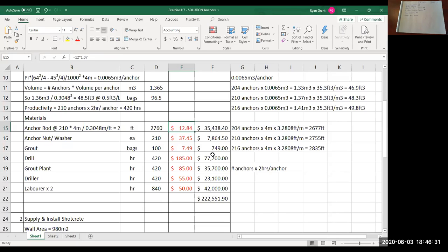When you're estimating in the real world, the vast majority of your material supply quotes, I'd say 95% of them, will not have any taxes whatsoever included. So no PST as well as no GST. So you as the estimator have to add PST to all of your materials.